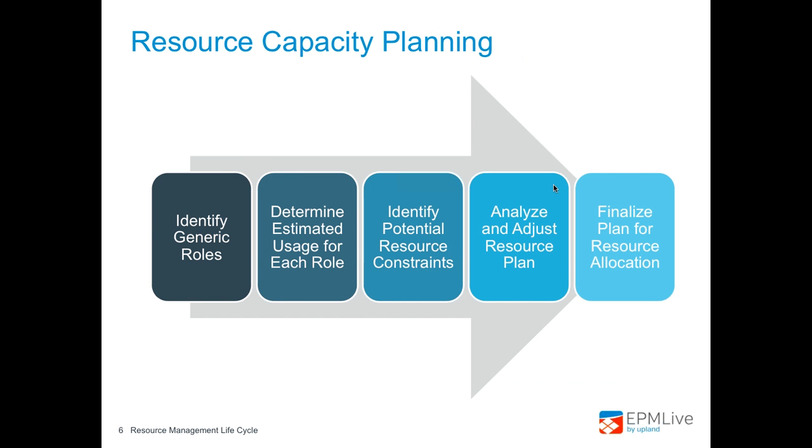Capacity planning helps to ensure that resource capacity meets current and future business requirements in a cost-effective manner. In this planning stage, you will need to identify all the roles needed for the given project or work effort at hand. For example, which organizations or departments will be involved in your project. This will help you establish the structure for your project, potentially establish how your tasks will be organized, and even identify security constraints. What disciplines and skill sets are required to complete your project?